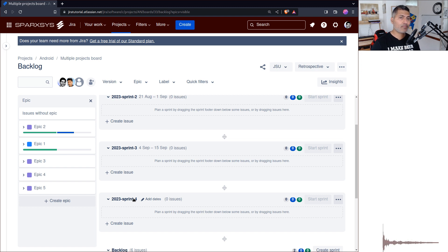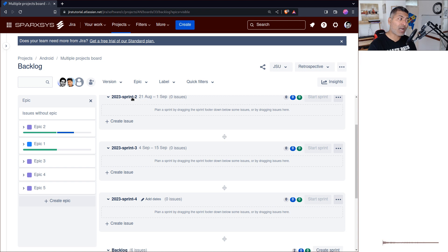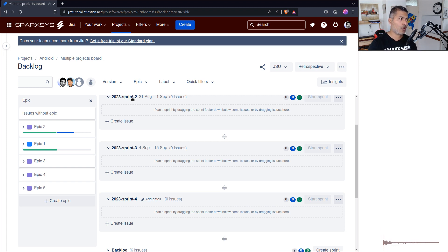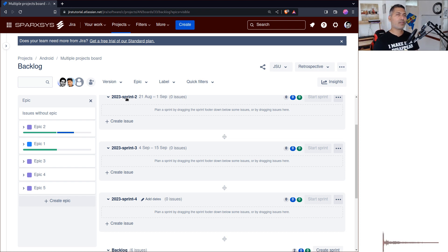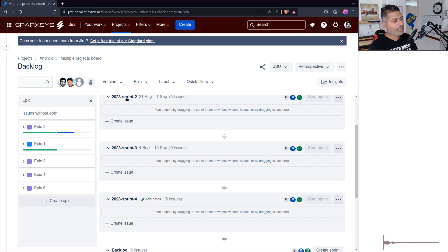Also, don't use the project name in your sprint name — there is no point. If you're using something like Advanced Roadmaps, having the year as prefix and the number as suffix will help you irrespective of what's in between. By looking at the sprint name you can easily identify which team or period it belongs to. If you do need to include a team or project name, put it in the middle — not as a prefix or suffix.